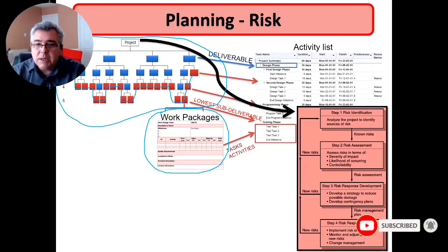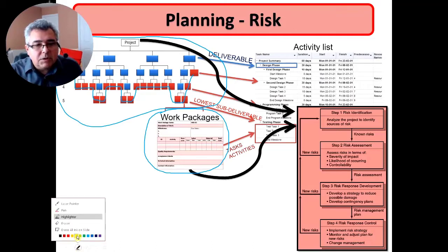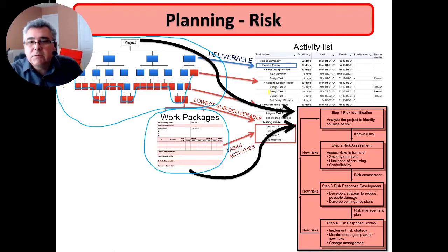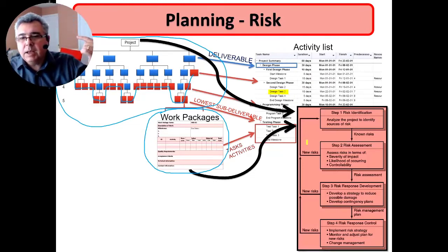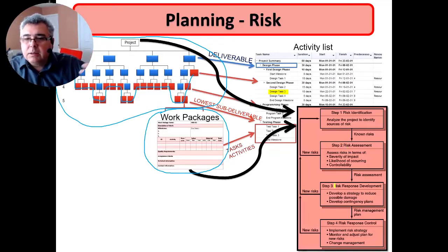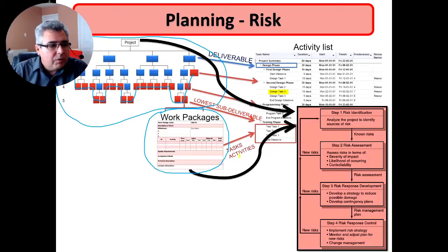We develop the risk based on the activity. So we have to take each activity. For instance, let's suppose that activity over here. And we have to identify risk that can affect the activity, assess that risk, understand how critical is that risk, then if it is the case, develop some response for that risk. So those are the steps we'll be following in the risk assessment.